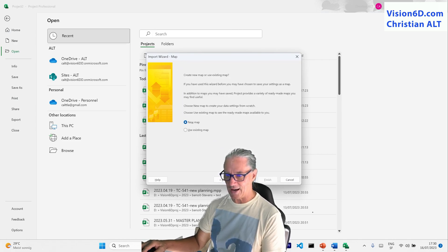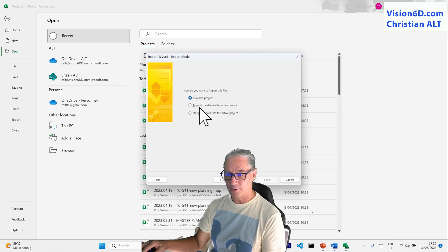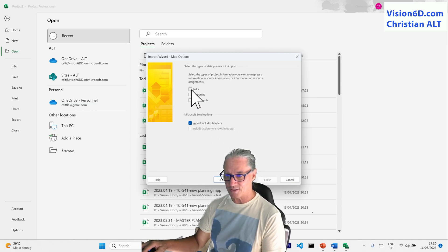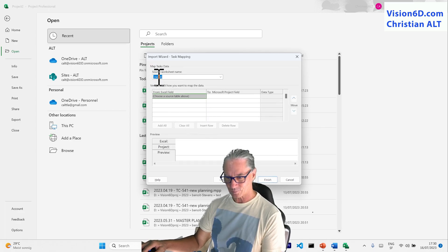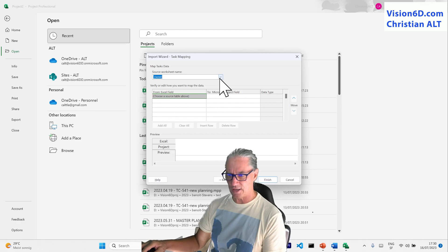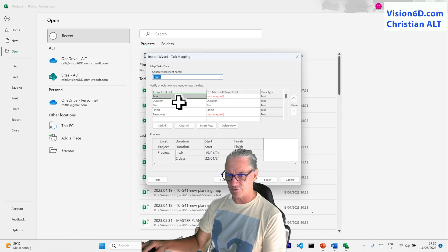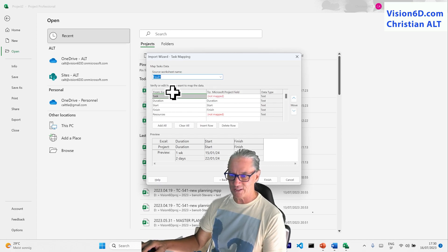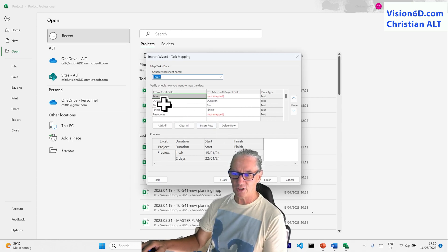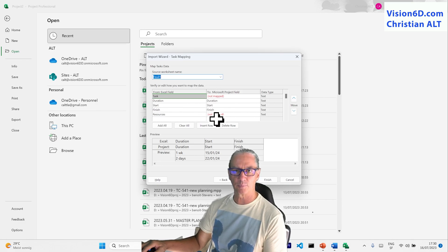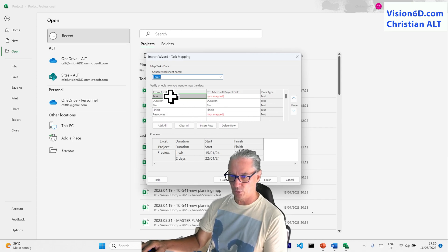I'm going to say I create a new map. I create a new project with this. And for this simple example, I'm interested in the tasks. So I'm selecting Next. Within the source worksheet, I have to define the sheet on which I'm going to work — in my case, Sheet 1. And you see some of the elements are in red, which means we have here the columns from the Excel fields and we have to map them to MS Project fields.